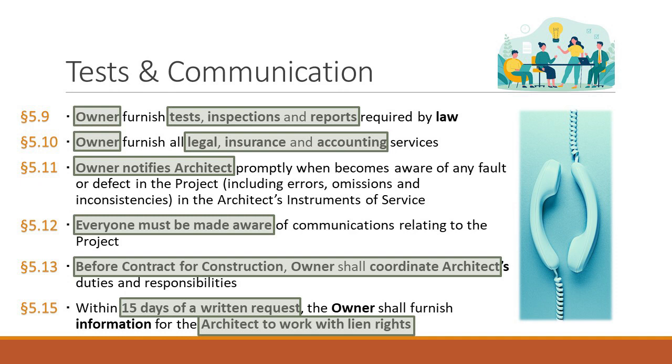And then the second part of this is, when you sign this construction contract, you give it to the architect. Because the architect later on, if you remember from last week, in Article 3, it talked about the various phases, and the last phase that the architect has is the construction administration phase. That's when the architect walks around the project site and makes sure that the project is being built in accordance with the drawings and specifications.